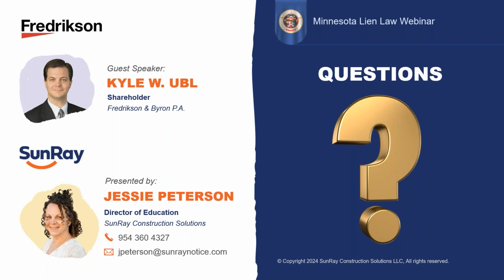Okay, and then the very last question that I see that has popped through here is, when is the deadline to file a Minnesota bond claim? That would be dictated by the terms of the bond. When a bond is a contract, just like an insurance policy is a contract. So, great question. If you're on a public project, you should assume that there are bond rights or bonds that are securing payment and securing performance, and you should ask for copies of the bonds. And then the bond agreement will set forth, just like an insurance policy would, the process for submitting claims. Okay, perfect. Thank you.